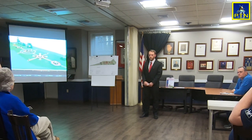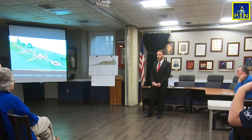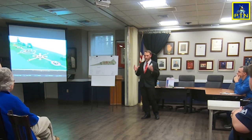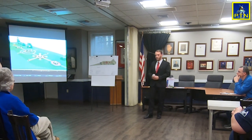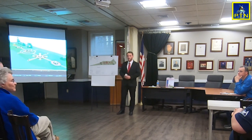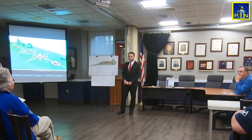And then the next question is site plan review. Has an application been made for site plan review from the planning board for this? We haven't moved forward with that yet because I wanted to give the public another opportunity to take a look at the work. Okay. So then I can craft a scope of work that everybody agrees with. Right now, we haven't made it to that point. Okay. Well, the site plan review usually solidifies some stuff and it would give us a really good idea of what actually was going to be built. Yep. And when and time.